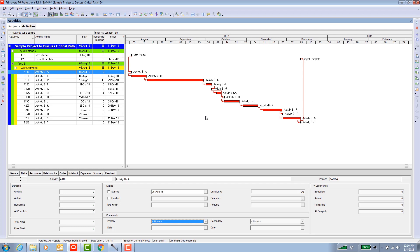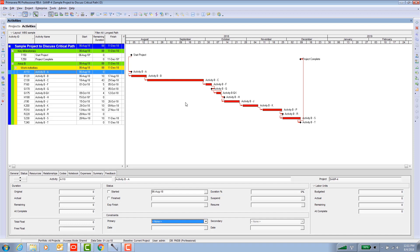That's a very handy filter. Something definitely to remember because in a simple network it will do exactly what you think it does, which is identify the longest path in the project. And now I have to warn you about caveat two. Caveat one was if you've got anything to the right you didn't mean to be analyzed it will be analyzed anyway. Caveat number two is no gaps allowed. The critical path must be continuous.